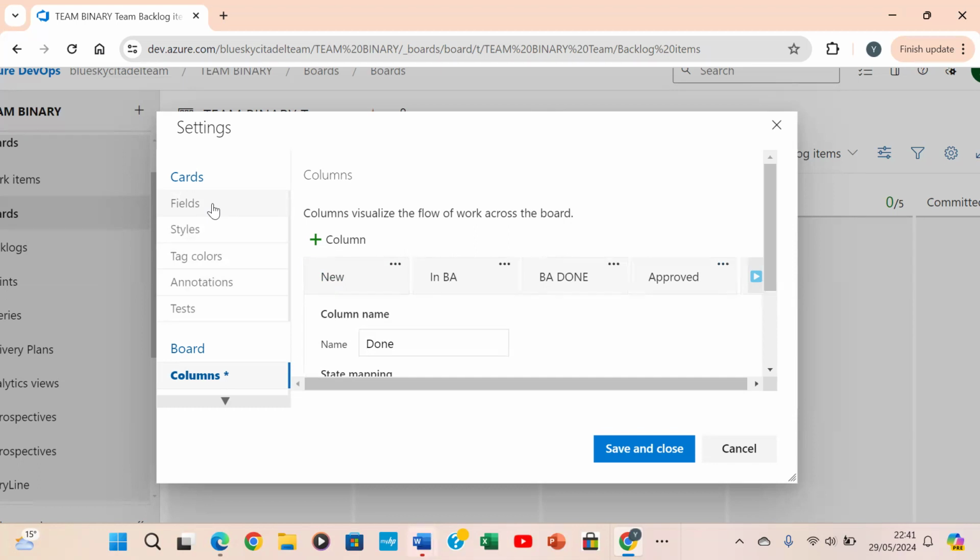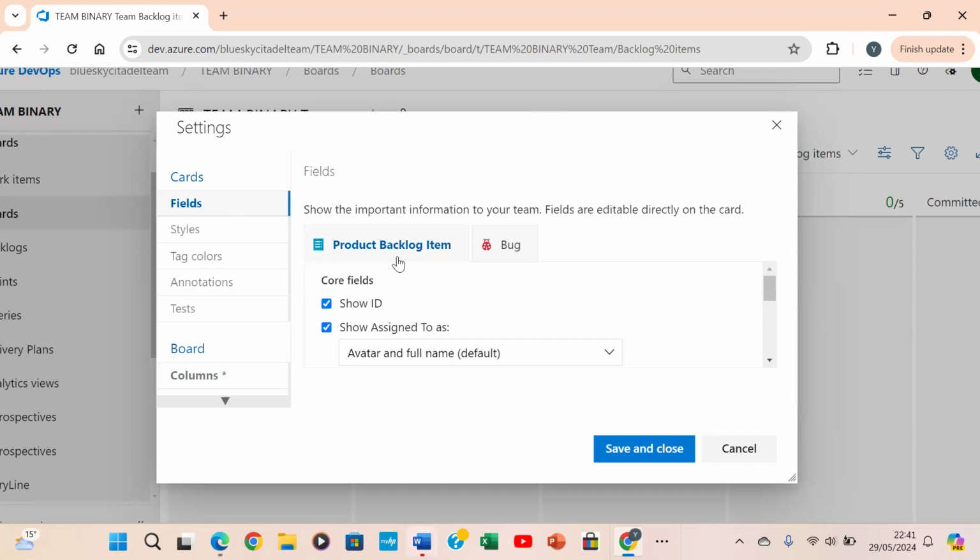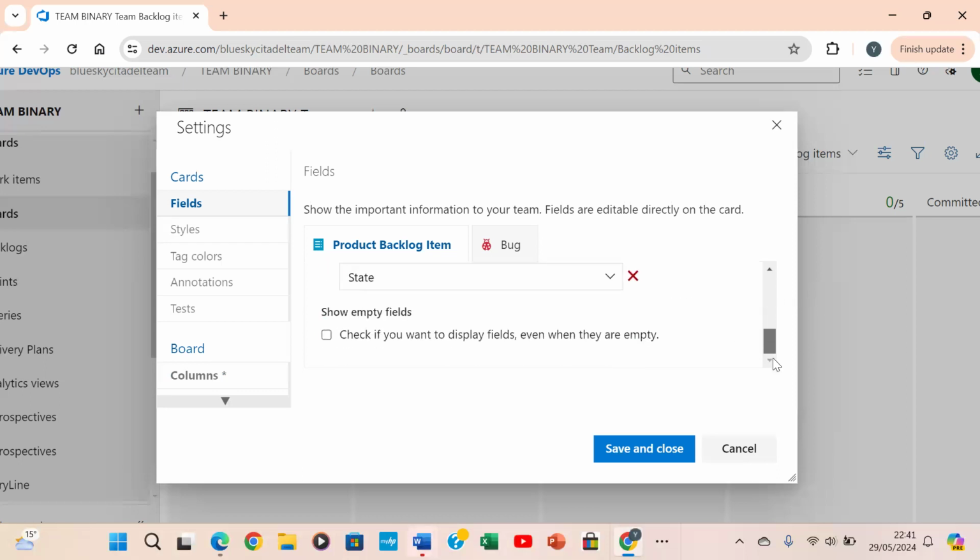Create work item for box. That's not good. Click on the fields. Okay, then under field, box important information. Show ID, show assigned. By default, the work item if it's created shows ID. Yeah, show assigned. I think there's still something more at the bottom. Show effort. Go down. Yeah, add more fields, story points. You can check that one if you want. We're going to do it anyway.